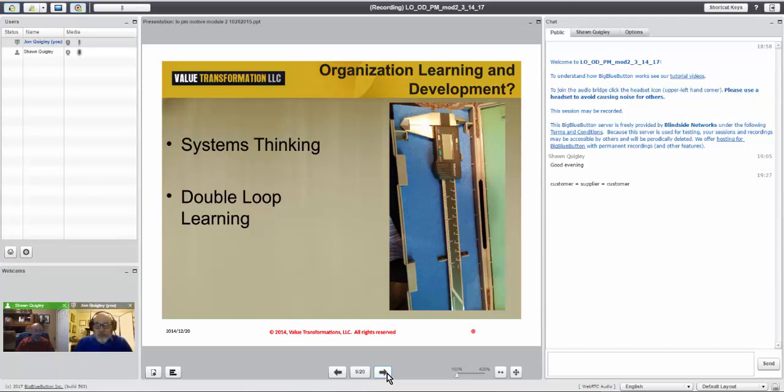Now, in the initiation phase, like I brought up earlier, when you're looking for something other than the cost benefit as far as making money in the corporation, the loop learning could be, we changed something in our previous project. We changed the floor setup for producing a tool or a control box. Now, I can use my new project to validate or invalidate the change that I have made. That is also an example of loop learning across projects.